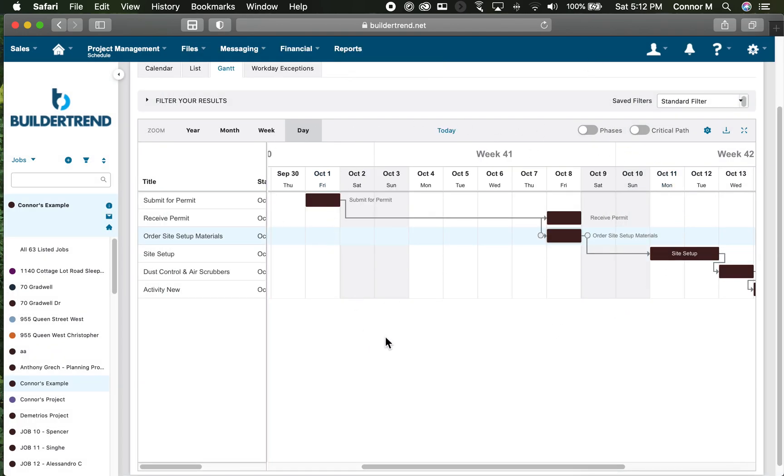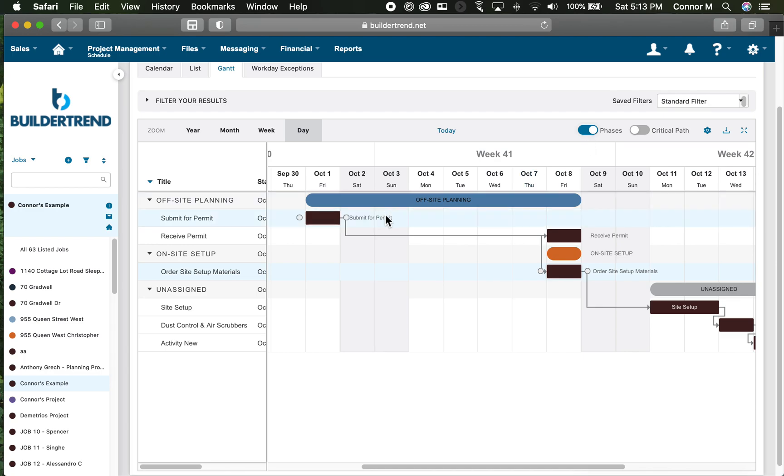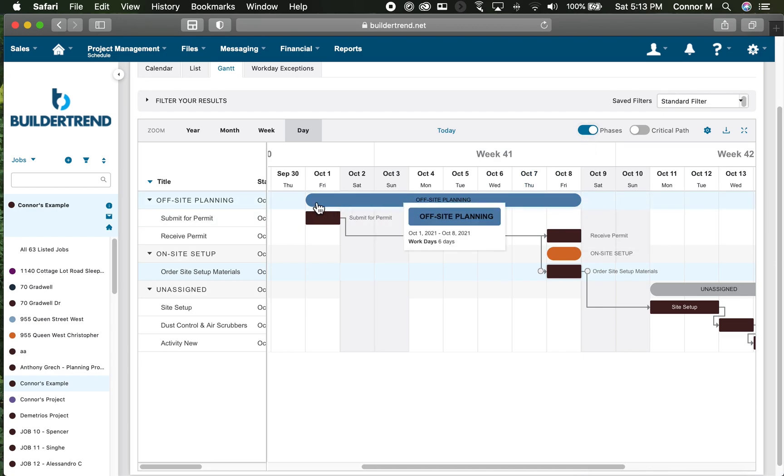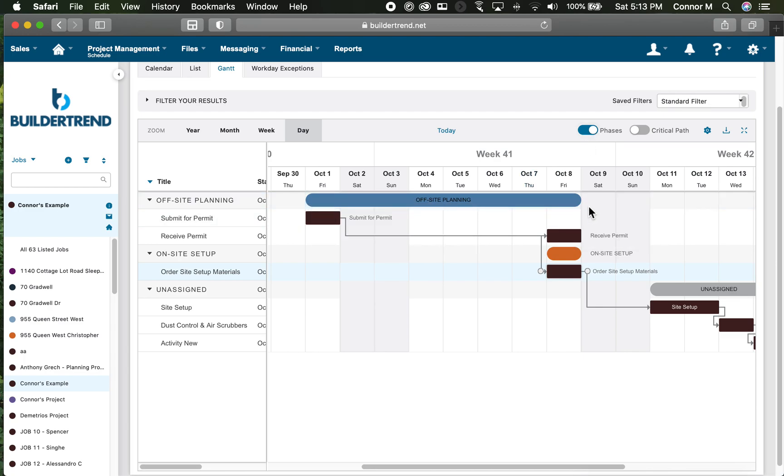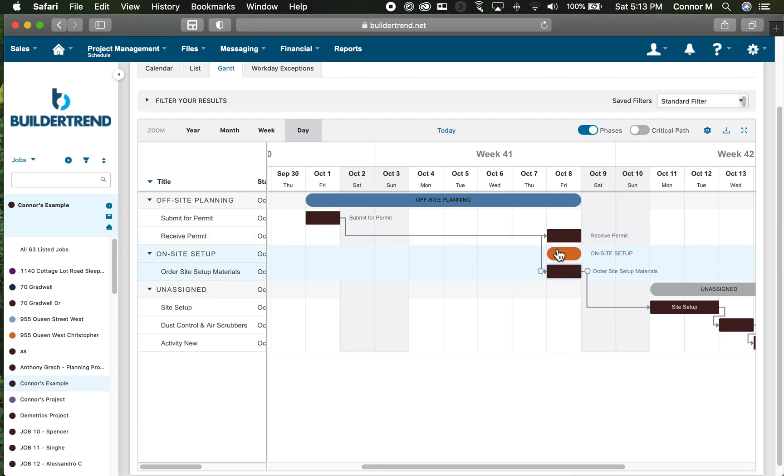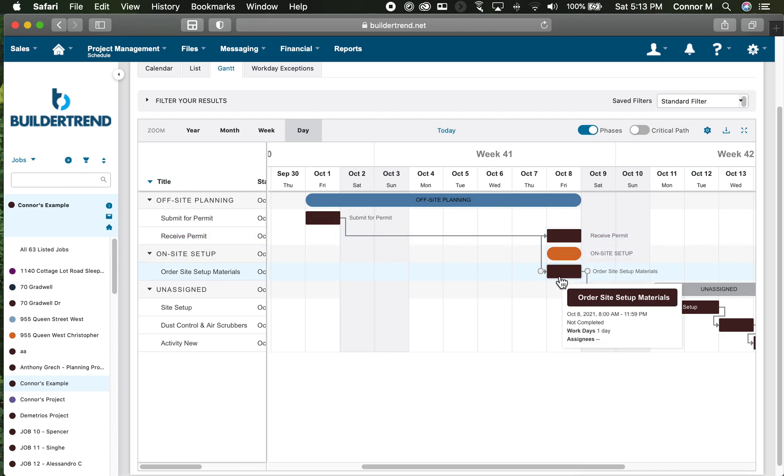If we go up to the top of our calendar, there's another toggle that says phases. If you click that, we now show off-site planning is six days, on-site setup is only one day because we've only set up order site setup materials.